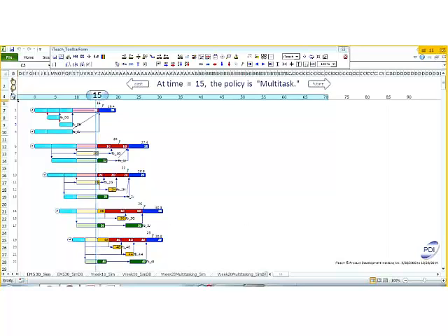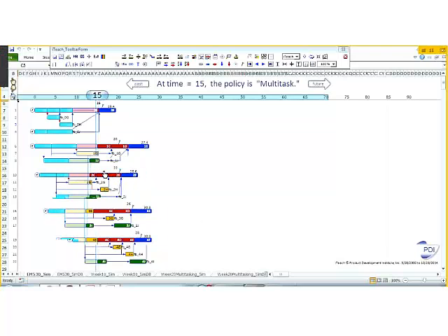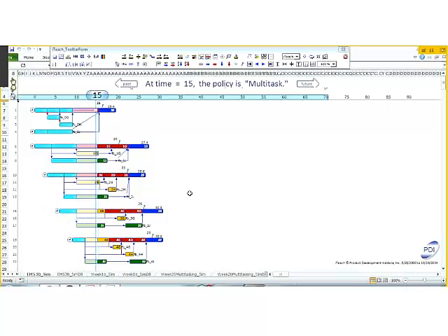All right, maybe Steve fell off the line, but you can see that he would push his commitment out to about week 50. So looking at the real performance of the real system, first of all, we can't meet these original commitments. Second, it's very difficult to predict when these projects are going to finish.